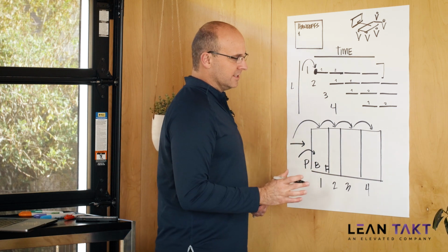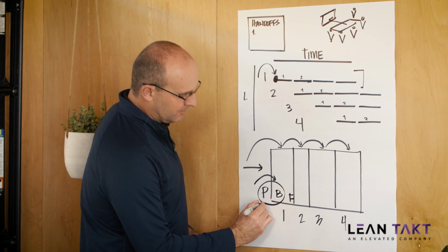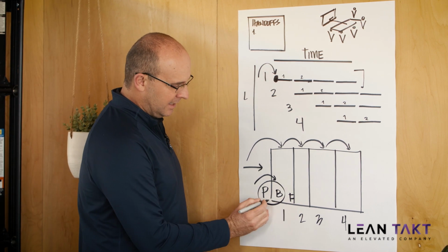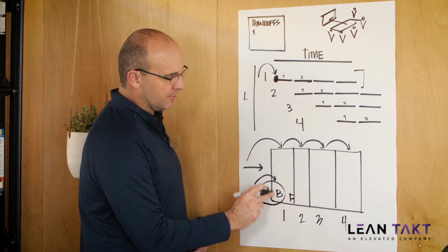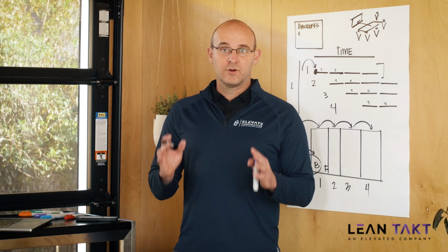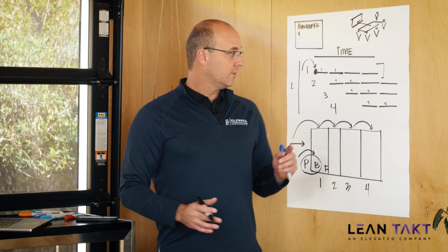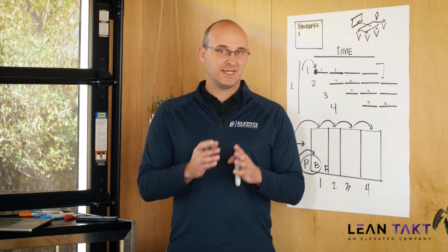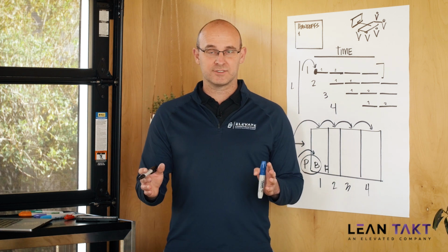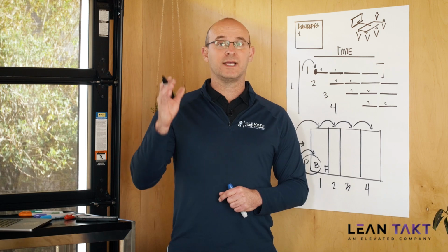But the key here is when the trade partner starts, you want to make sure that you check in with them, that they have a good plan and that they're ready to build and that they're building according to the quality expectations. You're going to want to go ahead and do this inspection or do this walk with this trade partner in this zone, at least from the 0 to 50% mark, so that they don't go too far without a walk and an inspection.